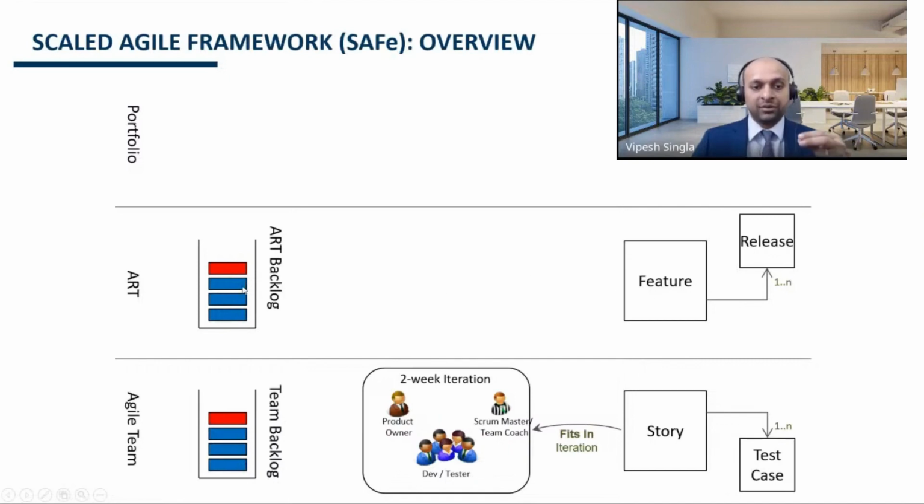Blue features are the business needs or business requirements captured as features, and the red ones are the enabler features or technical capabilities which work as a foundation for delivering the blue features. They are very similar to the enabler and business user stories which we discussed before. The core difference here is that features are bigger in size, and user stories are smaller in size.